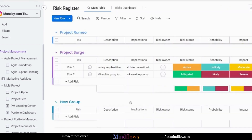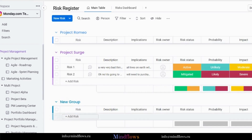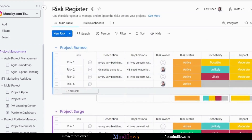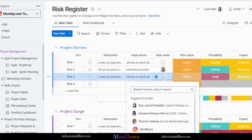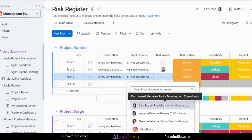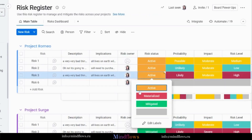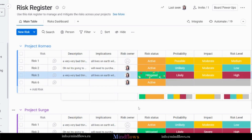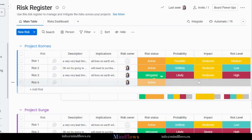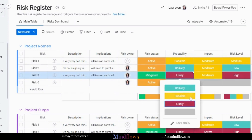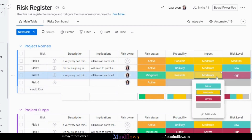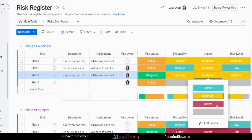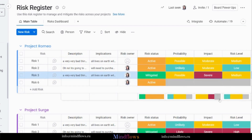You may add another group for every project that you manage and add items under it. For each risk, assign an owner from your team members to manage the status of the risk as soon as it has been worked on, and change the statuses based on how each risk is progressing. In this board, you will be able to change the status of the risk, probability, impact, and risk level.